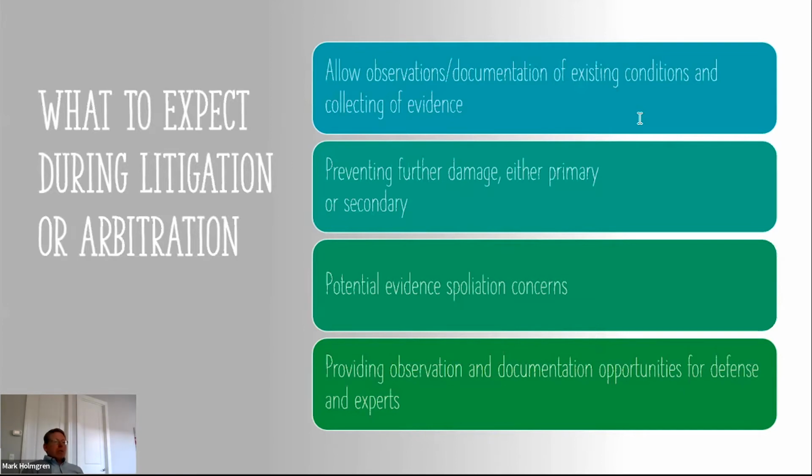The mediator shuttles settlement offers back and forth between the builder and the association, and tells the sides about the strengths and weaknesses of their cases. Generally they focus on the weaknesses of your case to try to push you towards the middle to get it resolved. And then if you don't settle the case through mediation, the last step would be arbitration.